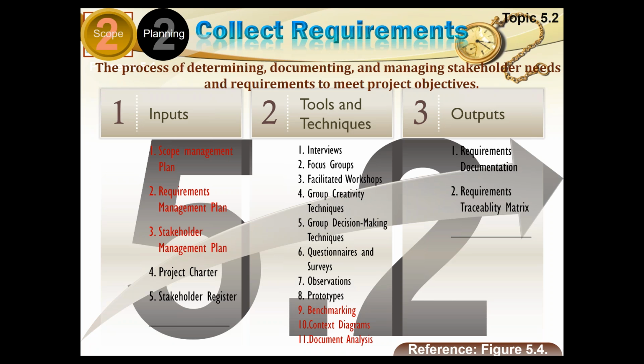Then the third method is the facilitated workshops. This is when you think that you have to reach out to the lower levels in the organization and get a general opinion from the people, or the opinion is to be gathered from a wide audience. So you may like to conduct a facilitated workshop in which you call a wide audience from the employees, and you present to them what is the job given to you and how you intend doing it, and then ask their opinion.